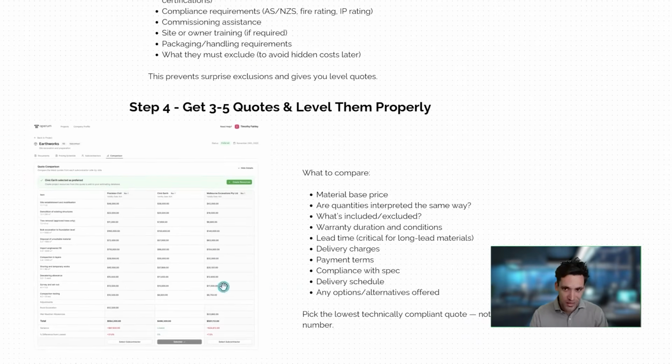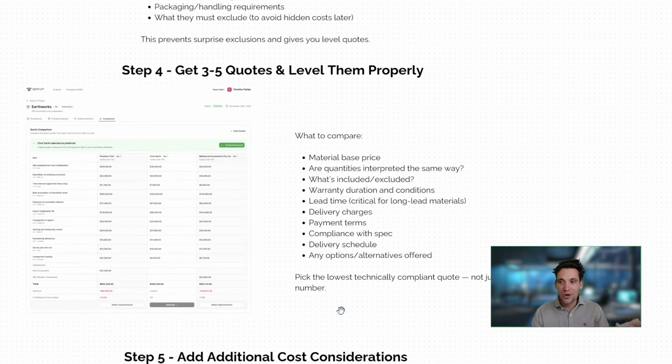But again, importantly with materials, you need to properly vet and check technical specifications. Then based on their inclusions and exclusions, comparing apples to apples, making sure they meet the technical specifications, pick the lowest cost technically compliant quote, not necessarily the cheapest one. You need a technically compliant quote.